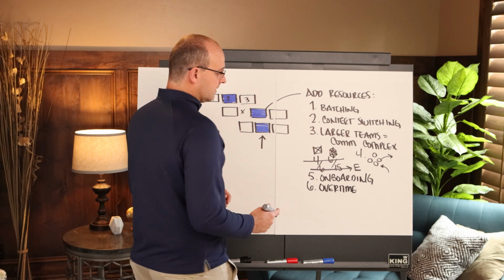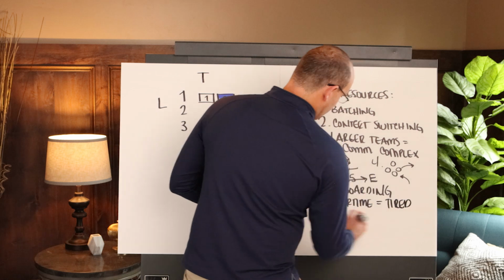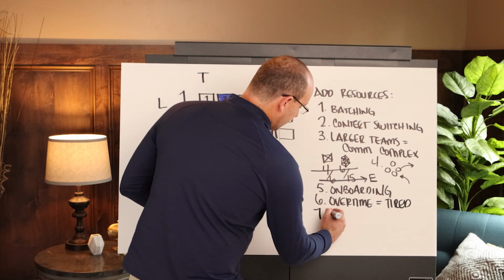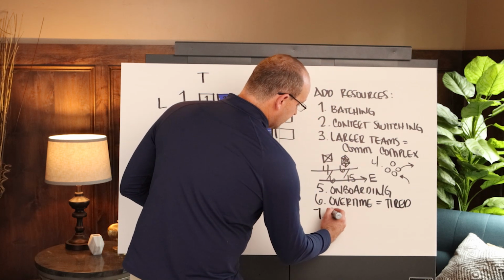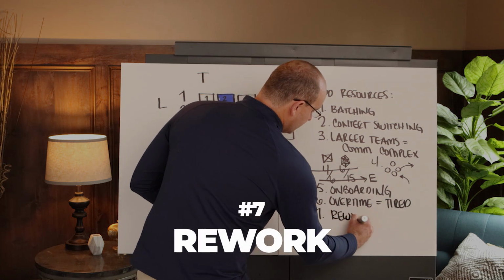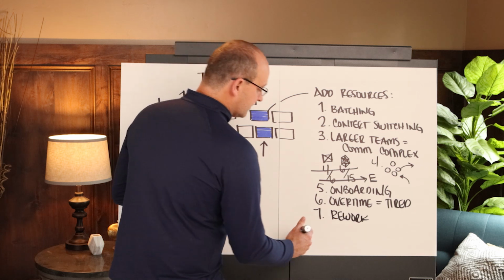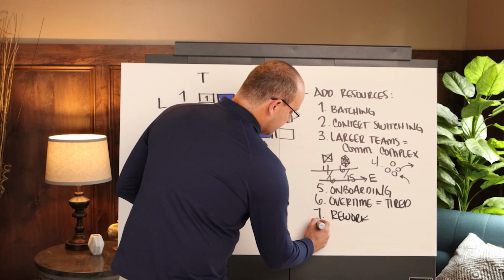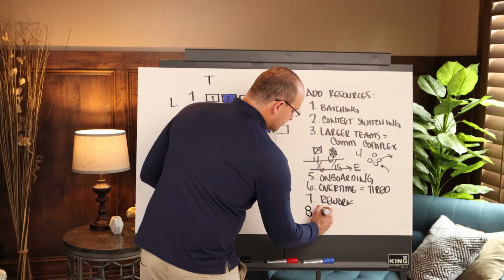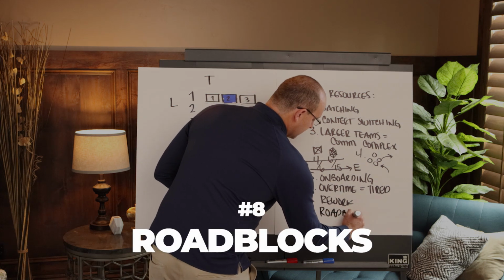At week 9, it becomes an exponential loss. So then the workers are tired. Once they're tired, then you have a lack of focus on quality. So now you have rework. And when you have rework, now you are spending anywhere from 2 to 12 times the original duration and cost to fix things, and now you have stopped planning, which means that you have roadblocks and stops and restarts.